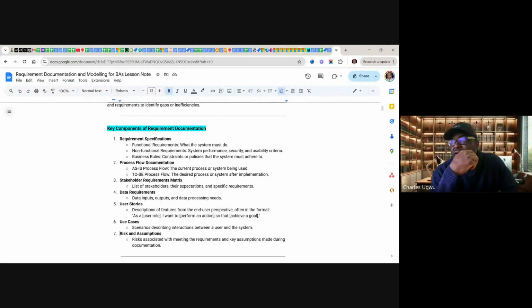If you equally look at the project brief I've given us, I think there is a list of stakeholders in the project brief and their expectations as well. So you should list stakeholders and put their expectation below every stakeholder. That's what we call project stakeholder requirement metrics.